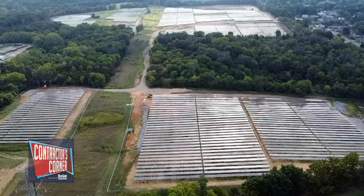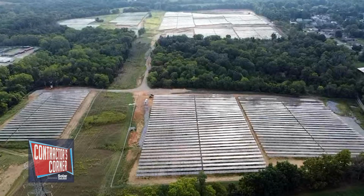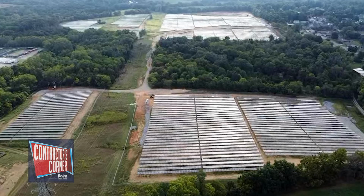There's companies that I know of that are inverter manufacturers that are very close to capacity, where their product has been bought out basically for the year. Or if you don't get in within the next, say, month, you're not going to get inverters this year. Rapid shutdown requirement is another, especially for the C&I space, is important and is a necessity. But those products can definitely be hard to get, especially because of all the other issues that are going on. But we've been told that transformers have like 28-week lead times on them, which is a big problem if you can't get those. So yeah, right now, other than, like I said, the skilled labor issue, I think procurement of long lead items is definitely on the list of difficulties right now. Yeah, it's slowing things down for sure.